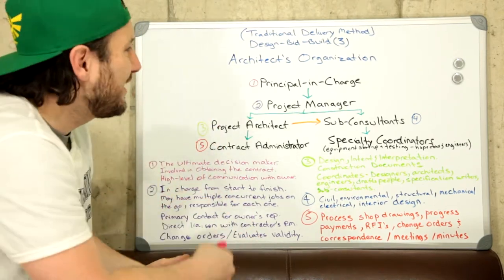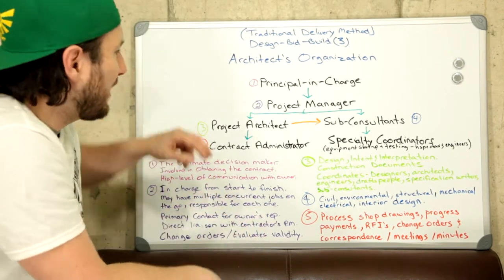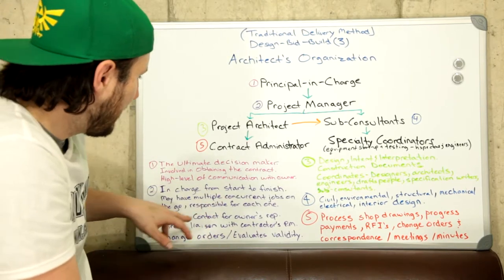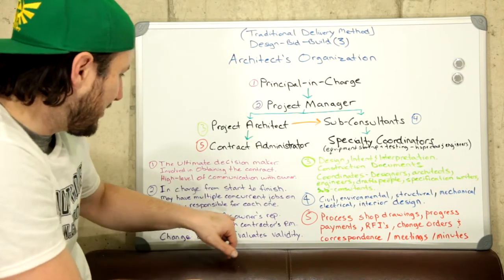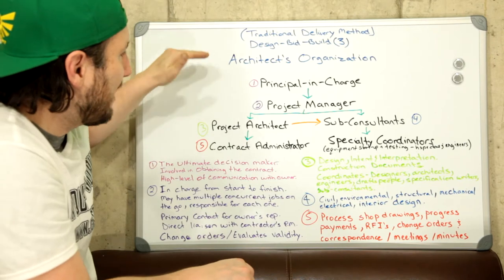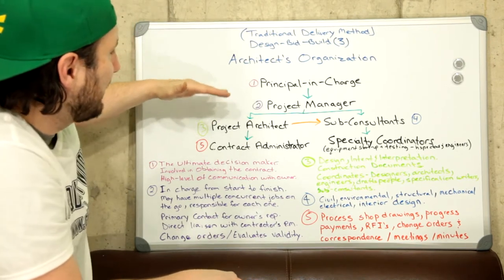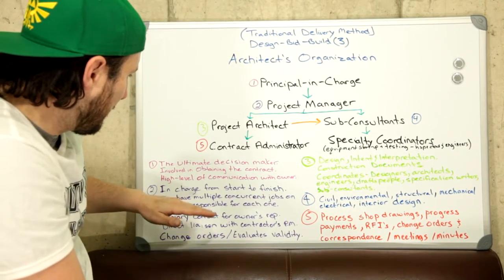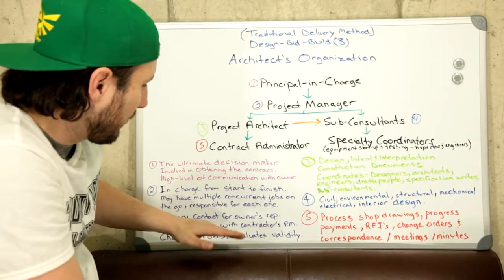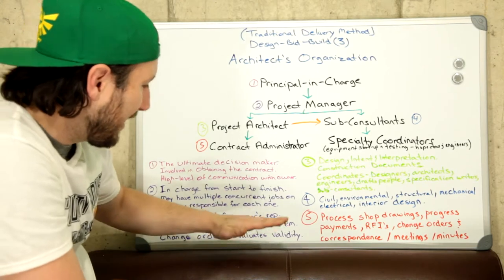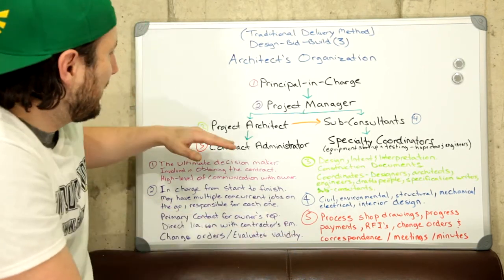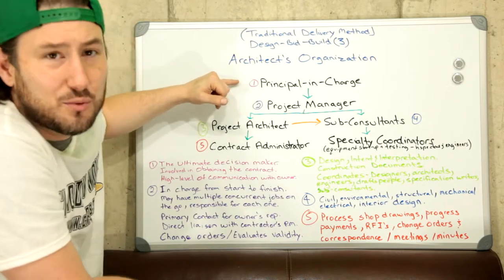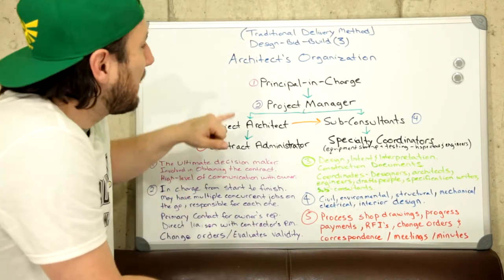The project manager works just like a project manager for a contractor — they'll have multiple jobs going on at once and are equally responsible for each job. The project manager is in charge from start to finish, may have multiple concurrent jobs, and is the primary contact for the owner's representative. They are also the direct liaison with the contractor's project manager and evaluate the validity of change orders.